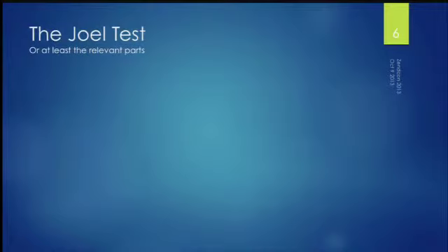So let's talk about the Joel test a little bit. Like I said, we don't need all of the questions. There's just a couple pieces we need to look at. The first question is, do you have specs? If you start a project and you get a one-page spec, you're probably not going to actually know what you need to build. Usually, the reason you get scope creep in a lot of projects is because things were not properly spec'd out.